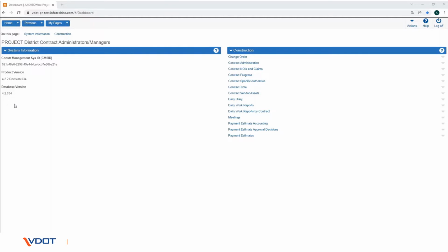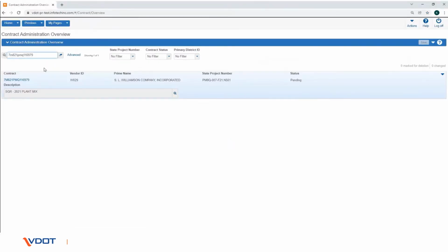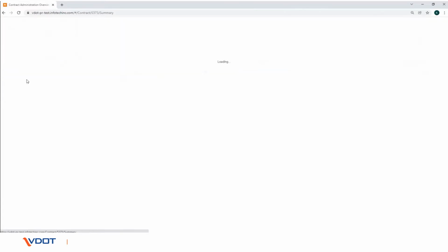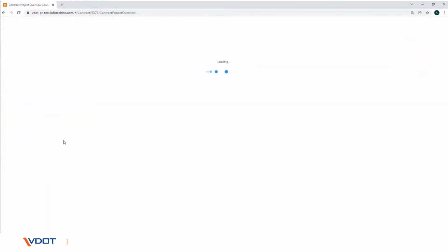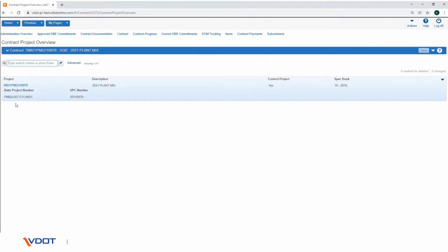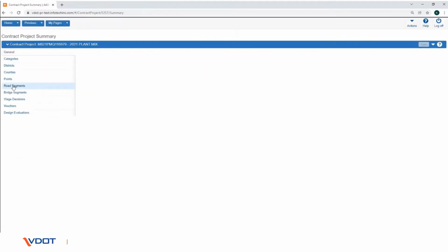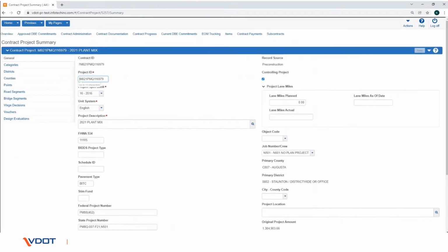In this video we will continue with the DCM initialization and walk you through the process of reviewing contract projects, categories, and assigning contract authority. Navigate to the Contract Administration component on the dashboard, and select the appropriate contract. Now click the Projects quick link on the top. Select a project from the list. Verify the project spec book field matches the specification book year in the contract.